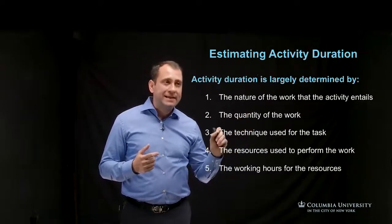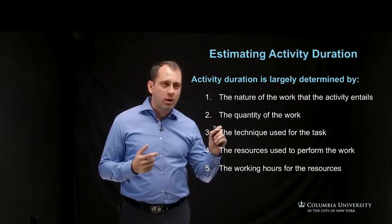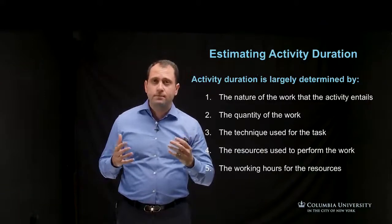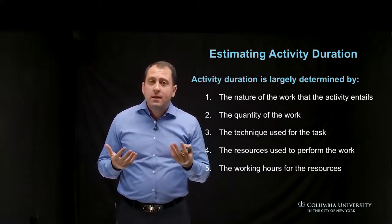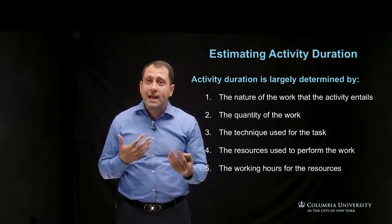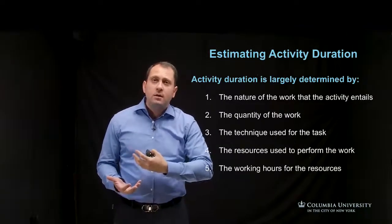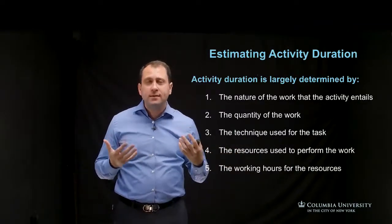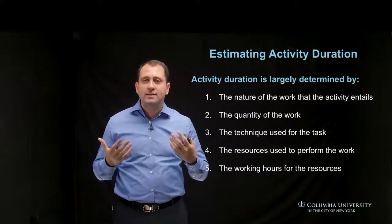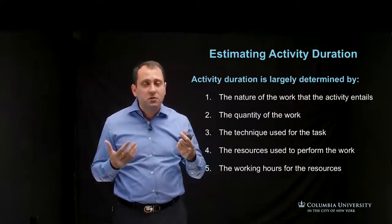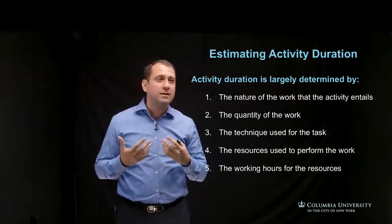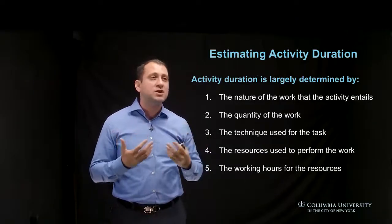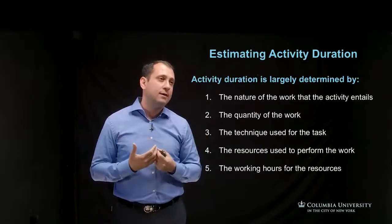Third is the technique or construction methodology used in that activity. For example, concrete pouring will take longer using a crane and buggies than using a concrete pump. So the construction technique needs to be addressed when estimating that activity, along with cost considerations and what's available from a time perspective.